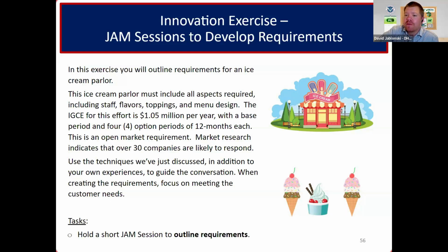And we recommend an advisory down select, where you advise vendors to proceed or not to proceed at the next phase. This is a great way to split the procurement up into two separate processes where you can reduce the number of people in that pool. You start with a light lift in phase one, then go to a more complex lift in that second phase with a smaller group of vendors. That way it's a little easier on yourself in the procurement process.